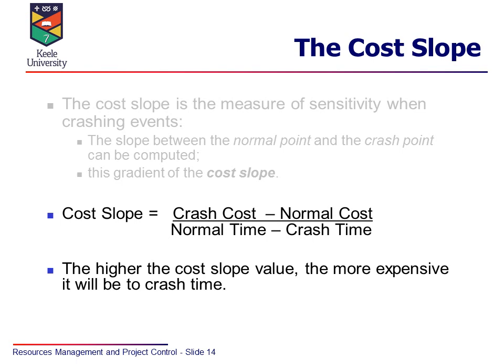This means when you're looking along the critical path and trying to consider which times you might want to crash to reduce overall project time, then it's invariably best to look for the one which has the lowest financial consequences, the one that's cheapest to reduce the time on. You'll be looking at this in the Whitbread sailboat case, because you'll be trying to crash and reduce the time of the overall project, and you'll be looking at which are the best candidates, which are the best activities to reduce that incur the least cost.